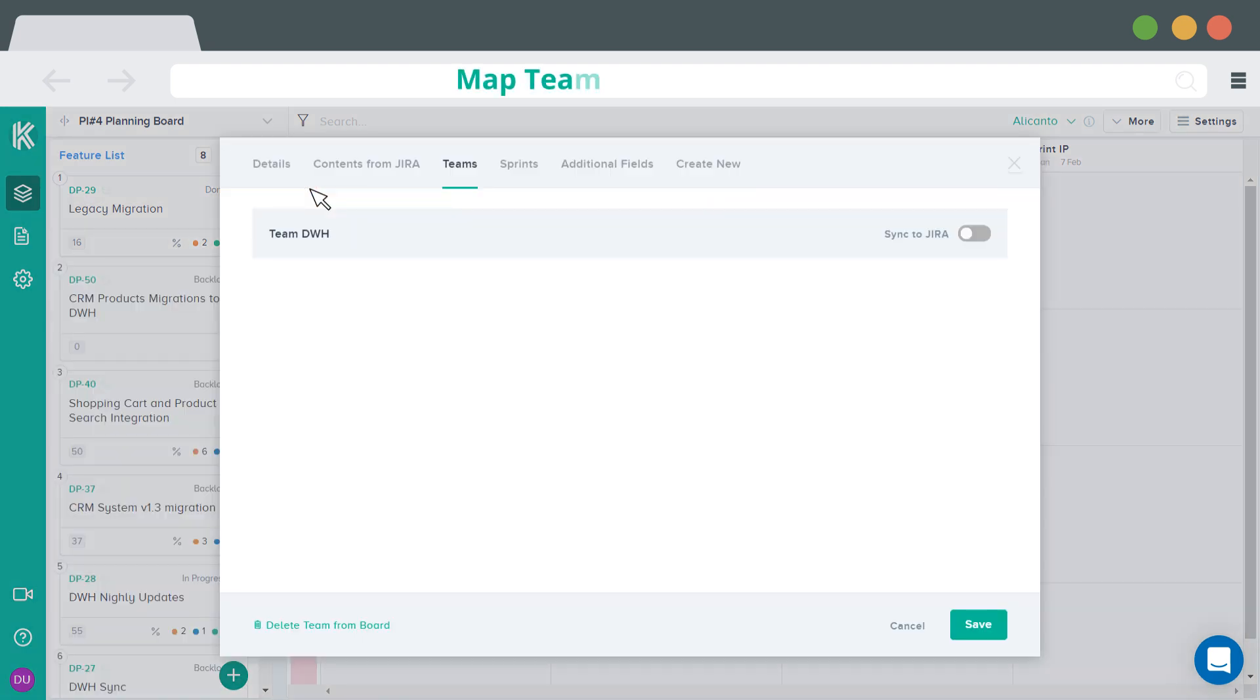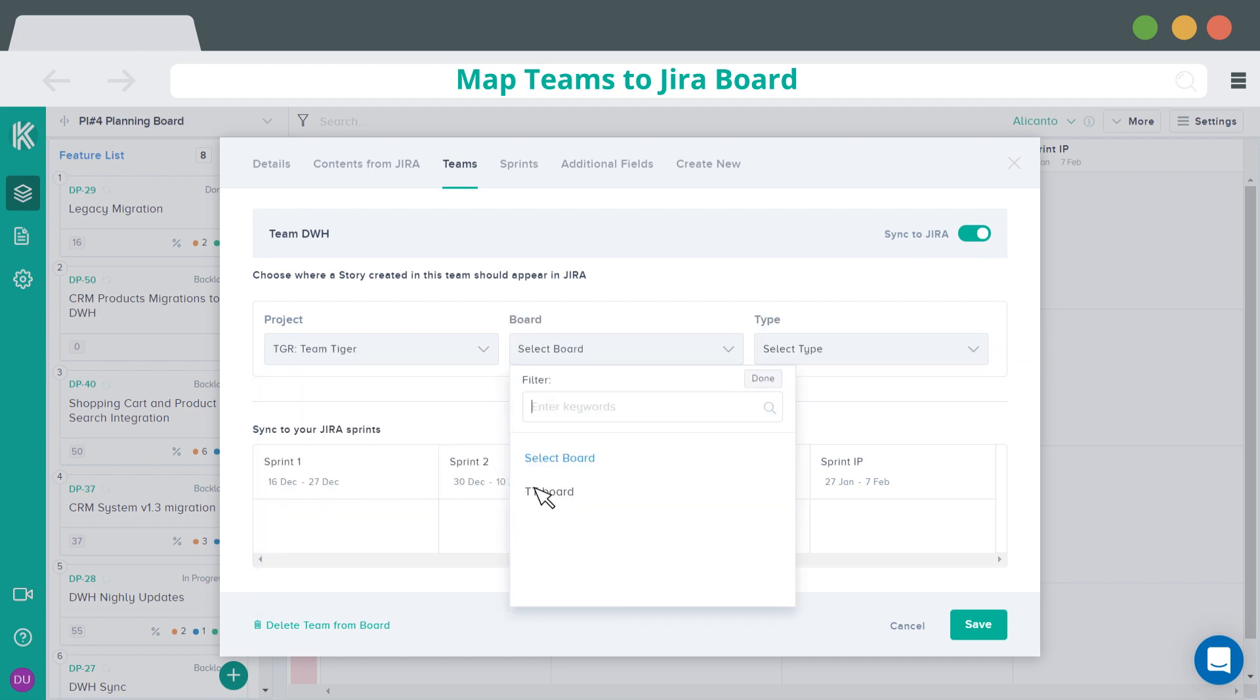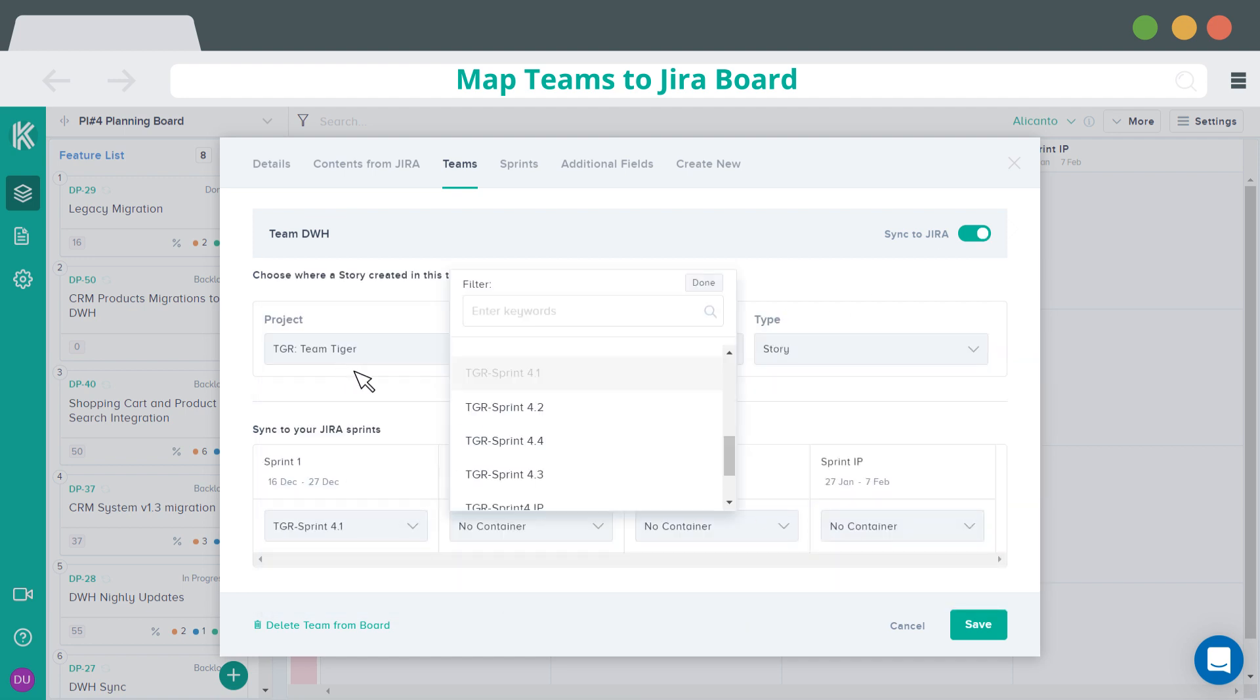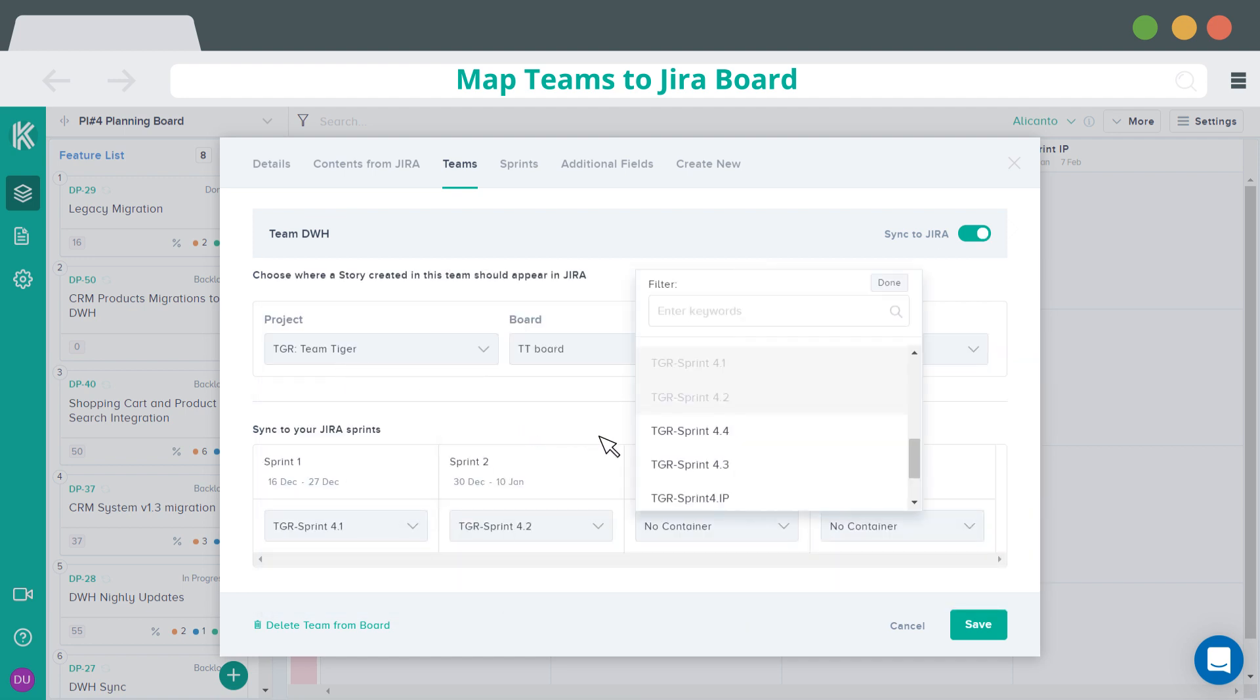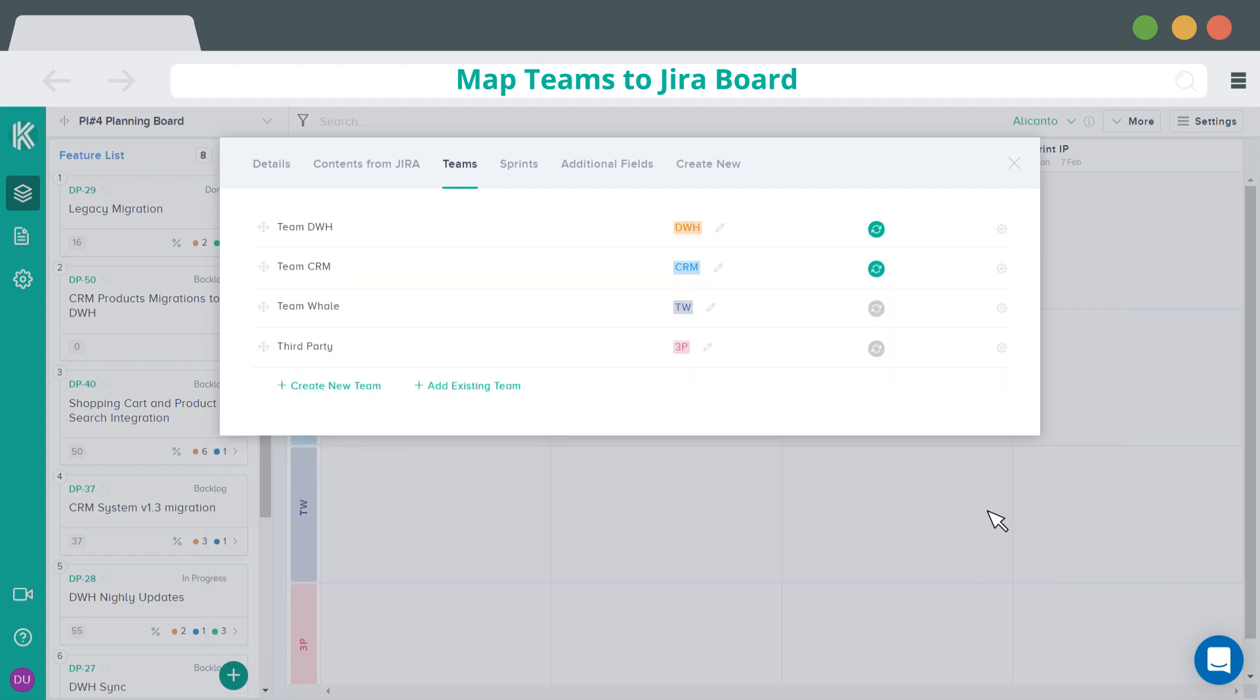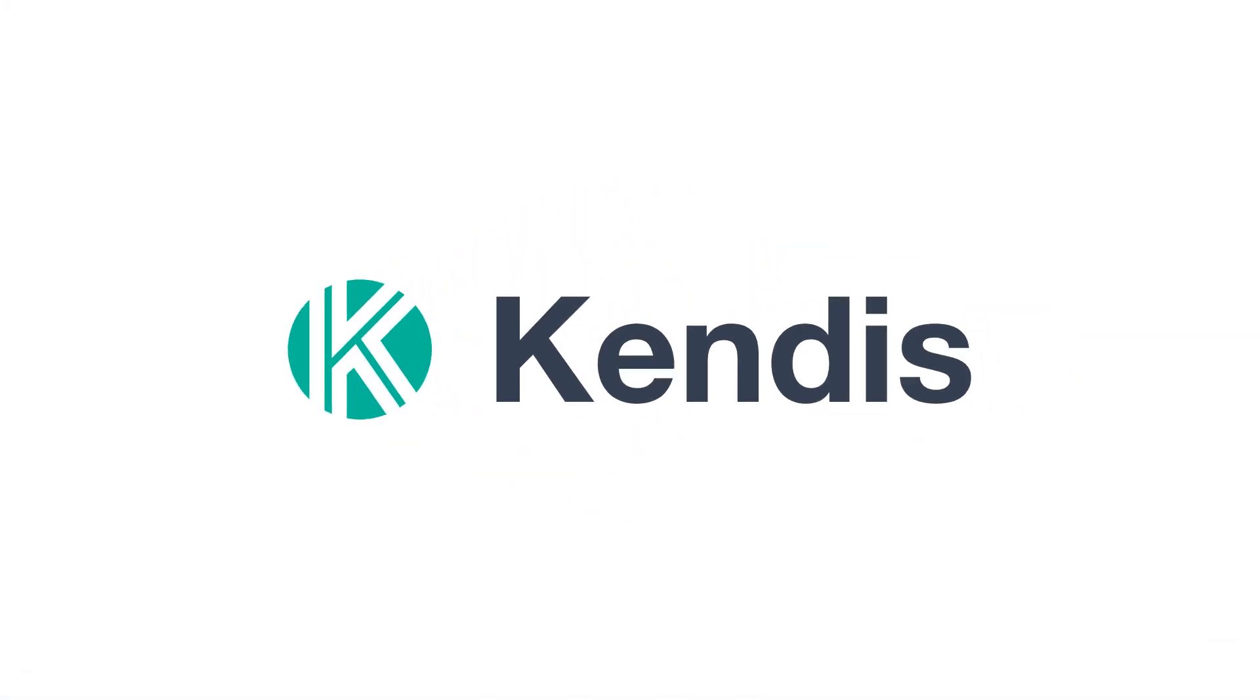Map teams to Jira boards. To map Kendis teams to Jira board, select the Jira project, Scrum board and Sprints. That's it. Your board is ready for the planning.